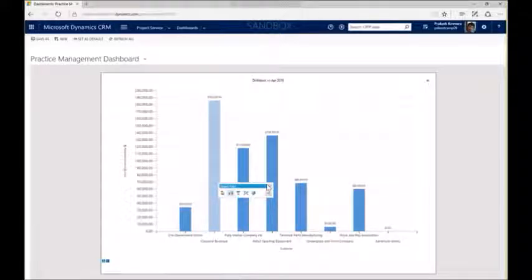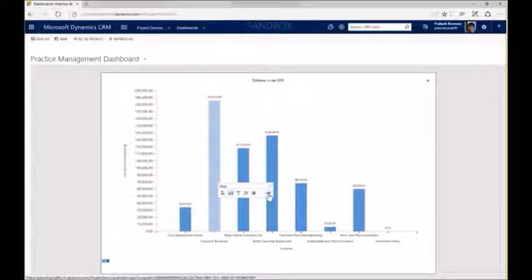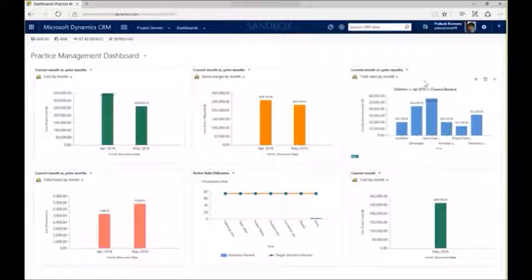And if I need to drill this down more, let's say perhaps I want to see that by role or resource, then I can continue to investigate and drill through there. This is in addition to the standard Power BI type tools that are always available with the Microsoft solutions. The same thing down in the left-hand corner, where I can look at booked hours by month for my entire staff. I can see April and May, and look at differences between the pace of how we're progressing on projects and how much time people are actually billing into the projects.